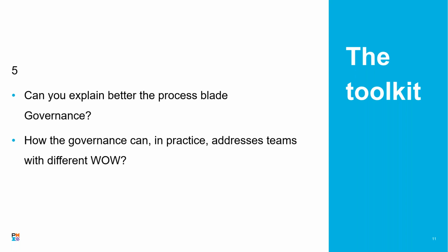So what happens is, recognizing that teams will work in different ways, we have to have a flexible governance approach that's risk-based. So as long as you find a way to pay down these common risks, such as, if you're doing a project, at the beginning of a project, make sure you have a common vision. And there's different ways you can do that, but as long as you've got that, and as long as your stakeholders are in agreement around that, then you're good to go.